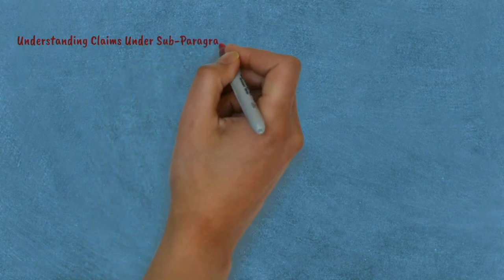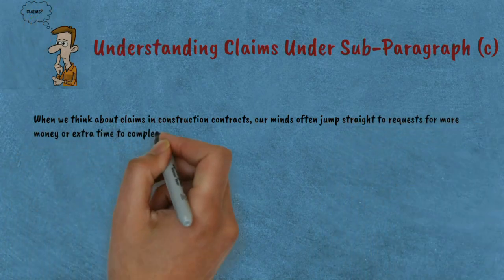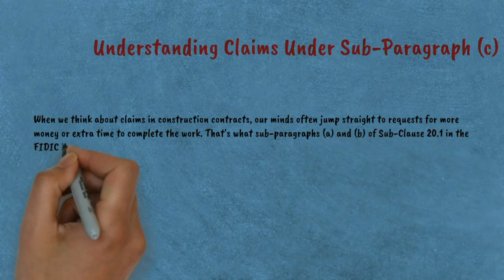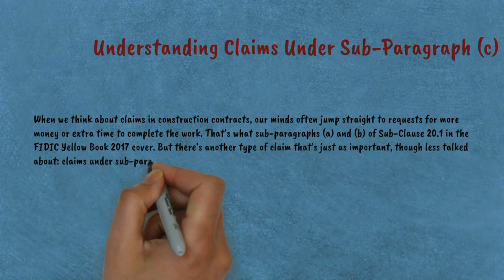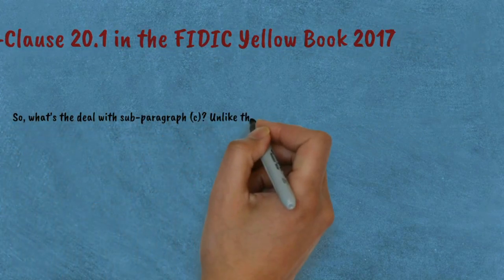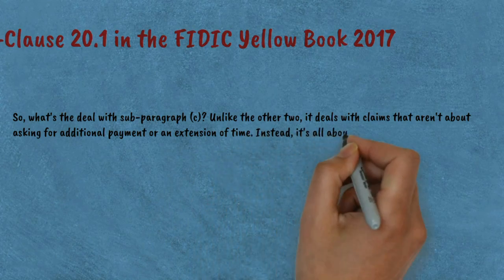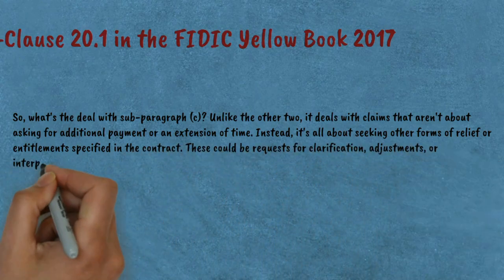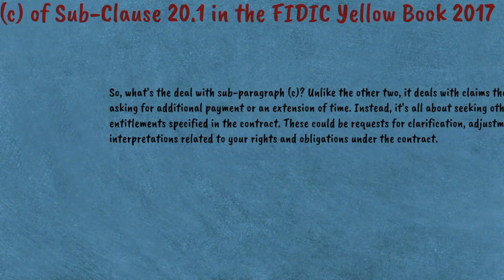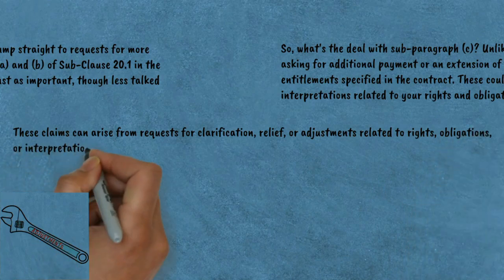Understanding claims under subparagraph C of Sub-clause 20.1 in the FIDIC Yellow Book 2017. When we think about claims in construction contracts, our minds often jump straight to requests for more money or extra time to complete the work — that's what subparagraphs A and B of Sub-clause 20.1 cover. But there's another type of claim that's just as important, though less talked about: claims under subparagraph C. Unlike the other two, subparagraph C deals with claims that aren't about asking for additional payment or an extension of time. Instead, it's about seeking other forms of relief or entitlements specified in the contract — requests for clarification, adjustments, or interpretations related to rights and obligations under the contract.